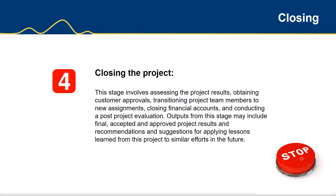The handover and closing stage is really important and business continuity should be a priority. I've managed many projects where penny pinching occurred and the user did not put enough in the budget to maintain business continuity — for example, investing in remote support, service level agreements, spare parts, and training. Sometimes customers have staff leave and end up with no EMS manager, to the point that they can't even log into their own system. So it's really important to close out the project with business continuity in mind. Training is critical and retraining schedules are important, especially with new staff coming and old staff leaving. It's crucial to have that built into the project with change control.